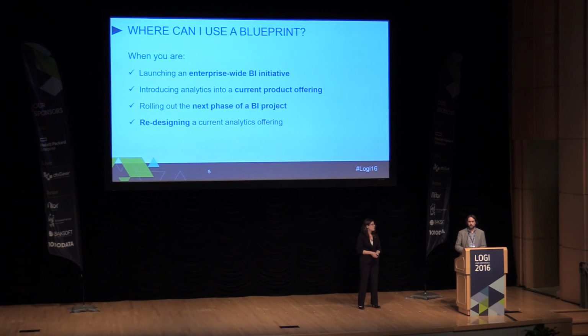And so the nature of the blueprint for us was to use all of the knowledge that we had gained up to that point and work with Jason Murray at Logi Analytics to actually then define, okay, who are our user personas? What are the user stories that we want to have? Let's put those out into a roadmap. Let's fine-tune our technology stack and make sure that our performance is set up correctly up front.